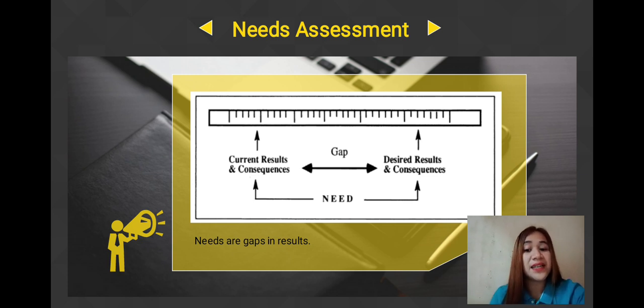So why is a needs assessment important? Needs assessment is important so that you will proactively address any gaps, you'll find the best solutions to problems, and you will keep project timelines on track. We have learned in the previous report that typically a needs assessment is broken down into three main parts or stages: the initiation, data collection and analysis, which involves data collection techniques such as document or data review, guided expert reviews, interviews, surveys, and many more. And also the final production.